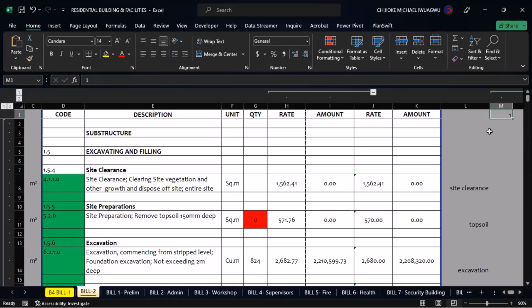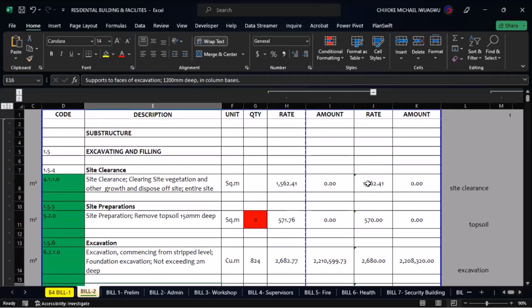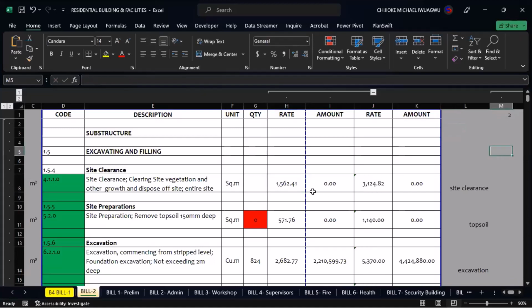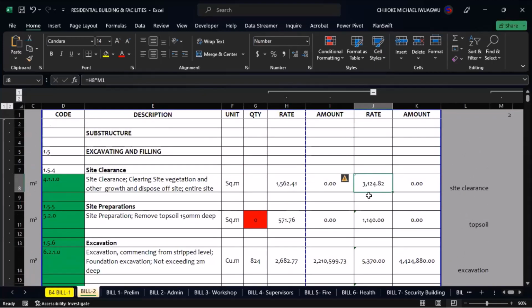So this way now, I have to reflect it for every item that I am pricing on my bill of quantity. That is the same thing that he has just explained to you in the form of scenario manager. It simply means that when I have 1 naira add-on, this will be the cost. But when I have 2 naira add-on, the cost will not be 1,500, it will now be 3,124 naira. That way, I can always manipulate it. Whatever I fixed here is the same thing that I will go down and fix in all the cells down. Which brings me to the filter I just mentioned.